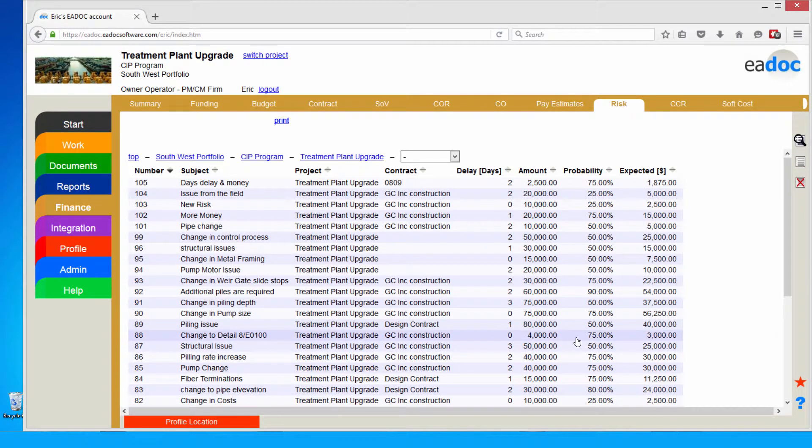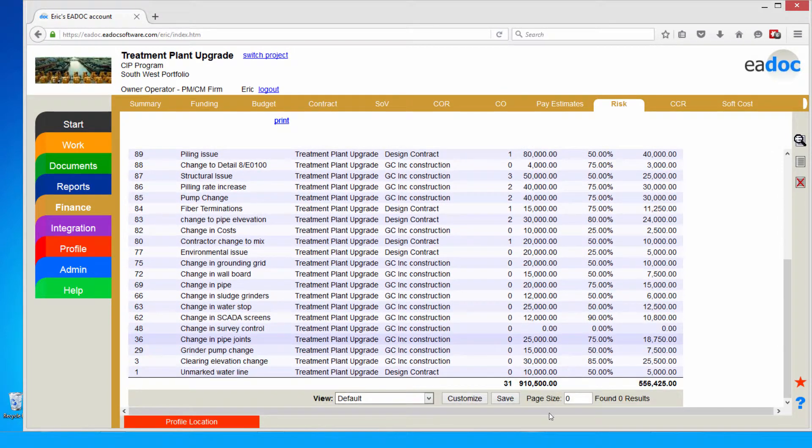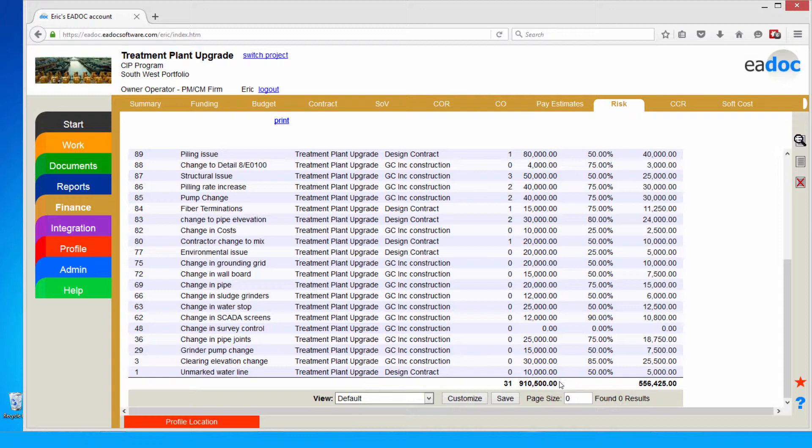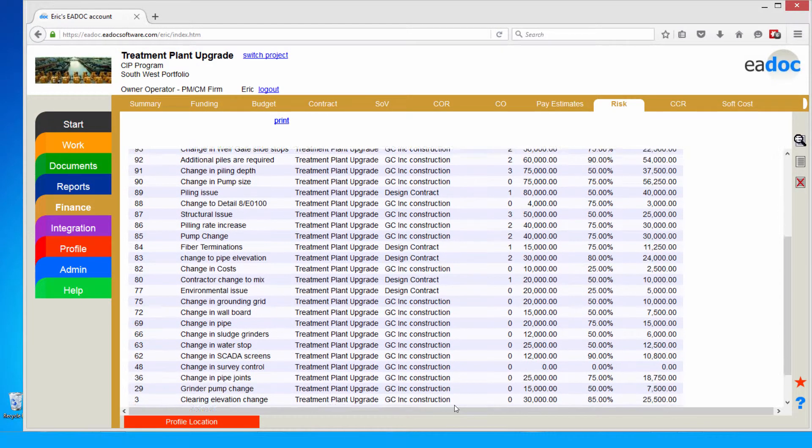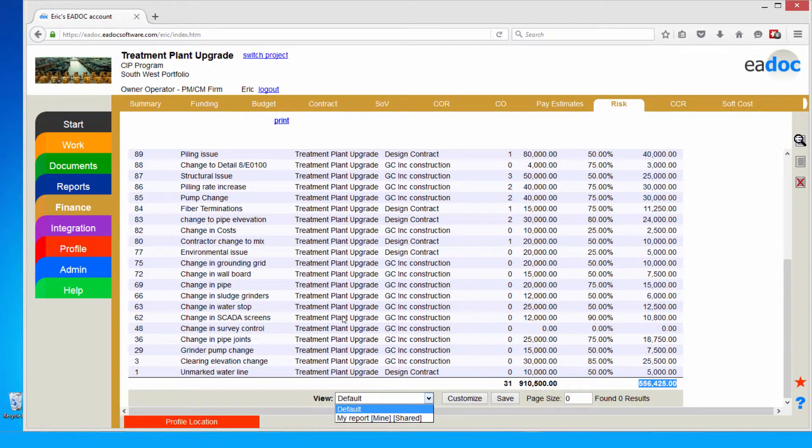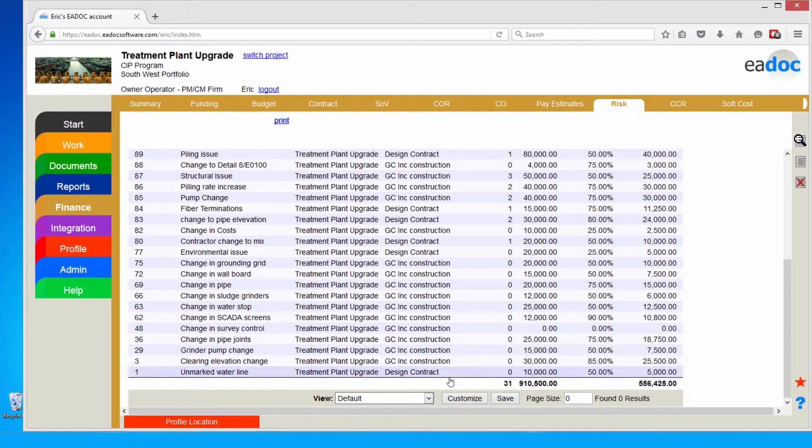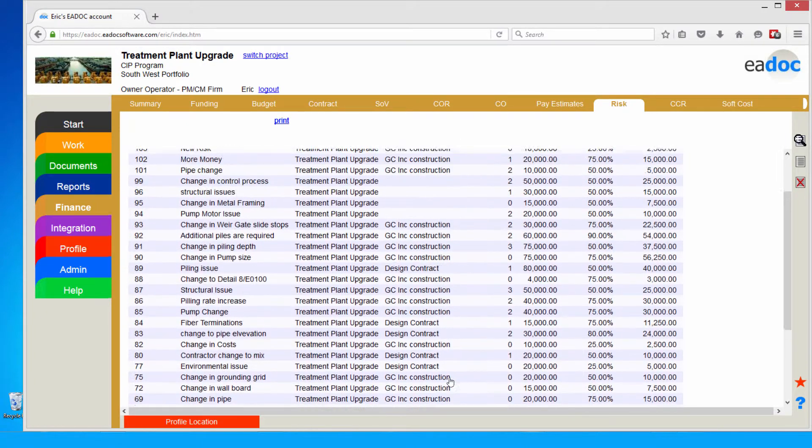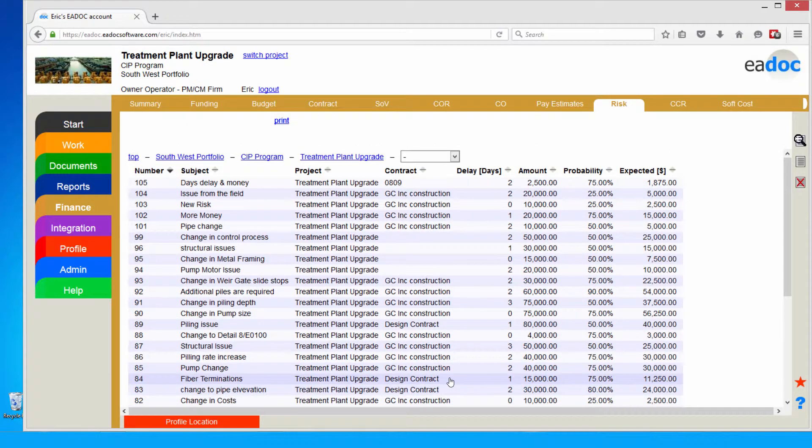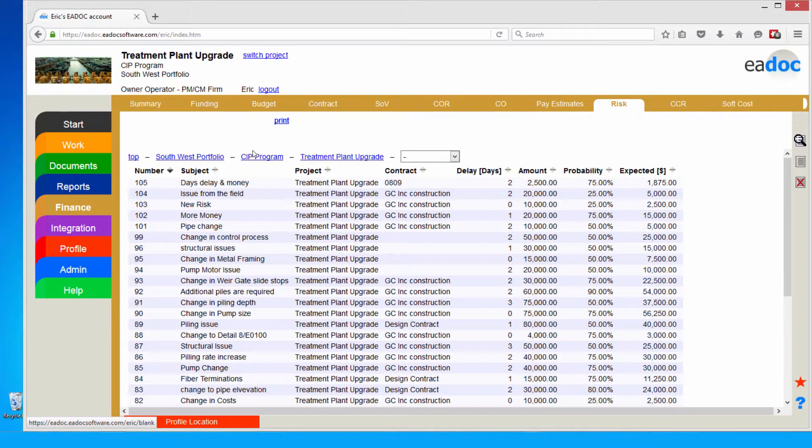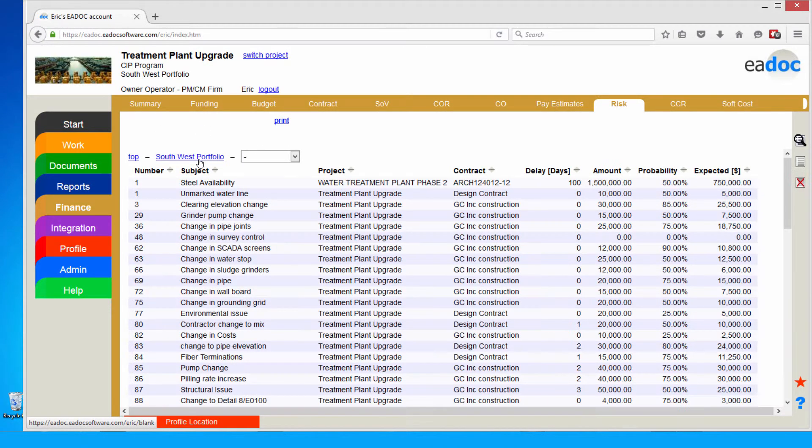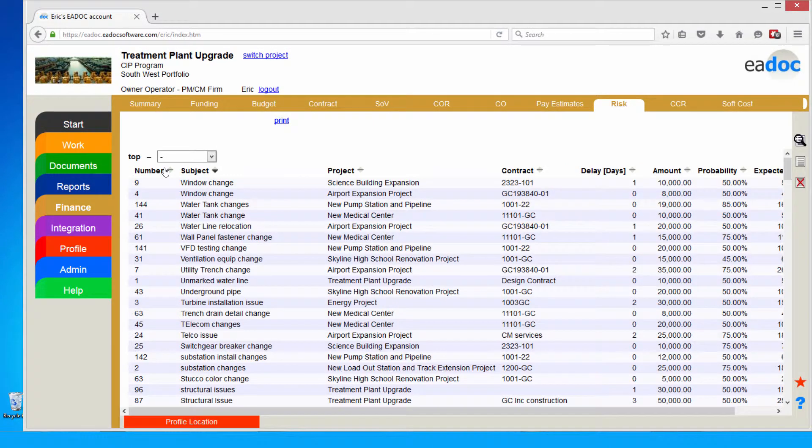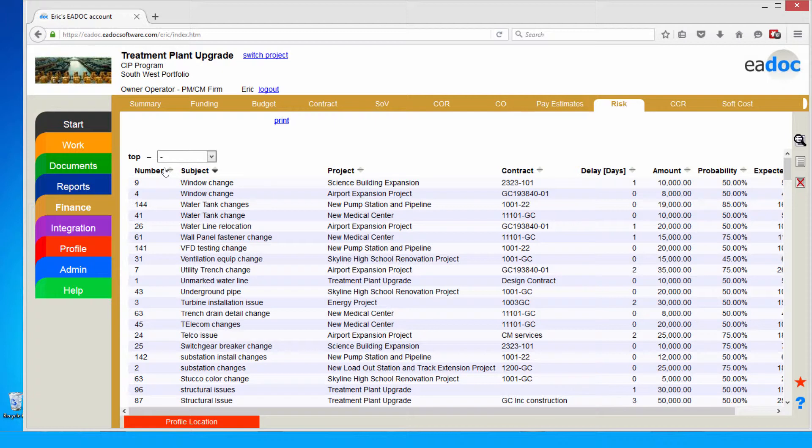I can see here in the capital project management system, my risk register, and here's my forecasted days and dollars. These dollars will roll up against my financial reports throughout the finance module. I can use this as a forecasting tool. What's my potential cost impacts if all these risk items were to turn into change orders? I can use a total value where I can see over here I've got a weighted value where I use that probability to calculate my cost impact. One of the great things about our system, as you'll see down here at the bottom, is I can actually configure these views. Every user has access to the risk register can actually come in and configure columns in the layout here and how they want their risk register presented to them. I can also roll this up. I'm right here at my project level. I can look at my CIP program, go to my Southwest water portfolio, and then take a look at all my portfolios. The great thing about our capital project management tool is it takes all that project level data and allows you to roll it up into programs and portfolios.